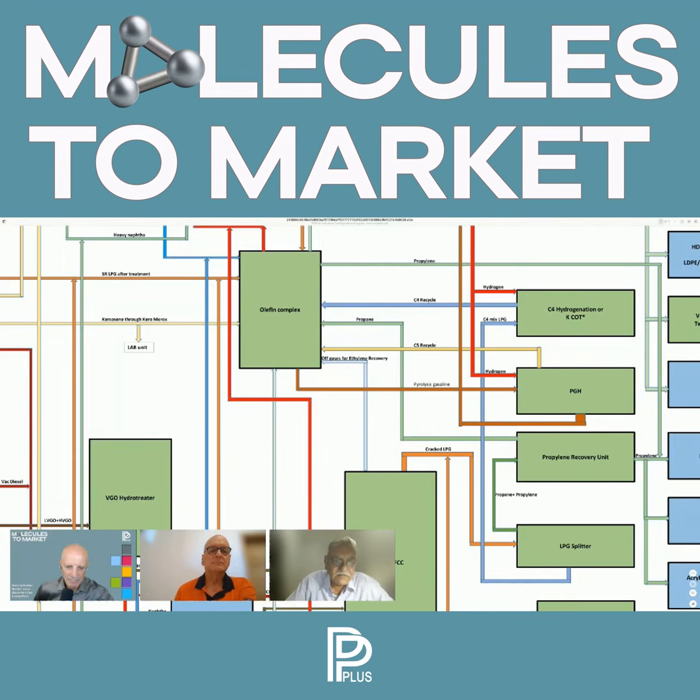So, if you look into the refinery, you can just scroll up from here. You'll see CDU, VDU, DSDT, VGO hydrotreater, delayed coker, FCC, the olefin complex we just discussed. Then go up further, and the aromatic complex. And so I can easily go for a managing licensor and basket all these technologies. As a public sector, I can't do it. But if it is a private company setting up the project, then they can make a choice between UOP and Axens, and all these technologies can be basketed.